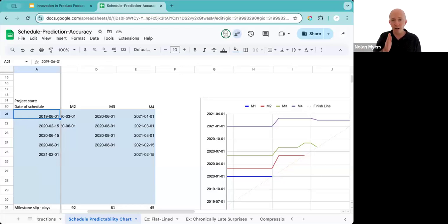And the second is that it's actually very powerful as a predictive measure of success on a project, because while you're in it, you can see as things are evolving, and it provides the data that helps you gain the confidence that the schedule is going to be met, or bolsters your skepticism that it's not going to be met and allows you to intervene and take corrective action there. So it can be powerful both in a retrospective and in a predictive kind of way.